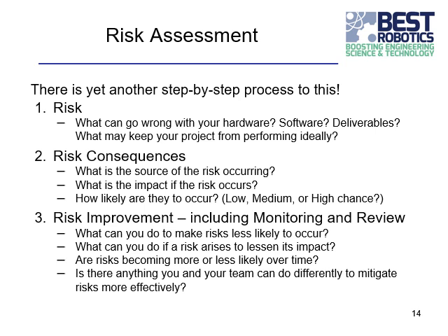And then you should consider something that's a low risk. Maybe you don't spend a lot of time improving your response to reducing the risk. But if it's a high risk, then certainly that's something you would need to do. So under the improvement, you need to monitor and review as you go through your 8 weeks. If you've understood certain risks, how are you doing in reducing that risk?